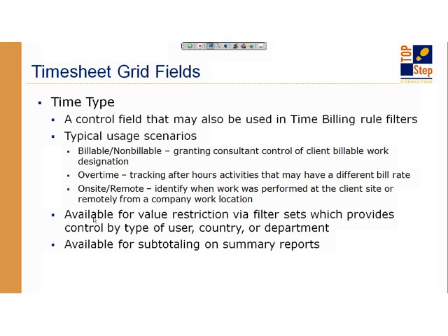I also see it quite often in situations where you can't track things like overtime. OpenAir does have a time card functionality, but it still doesn't recognize, okay, this is after hours. You usually have to handle that with special task setup or with time types to say, these 4 hours that I worked were actually overtime hours or off-shift hours. And then those can also be used in the billing rules because you may have negotiated a different bill rate for customers if you work after hours from their normal workday.